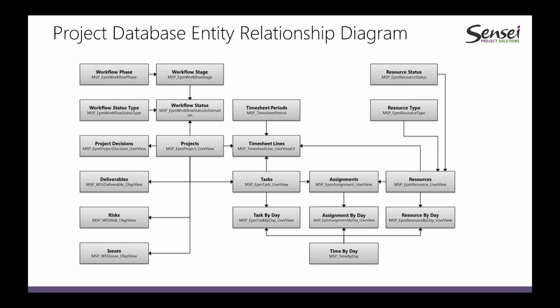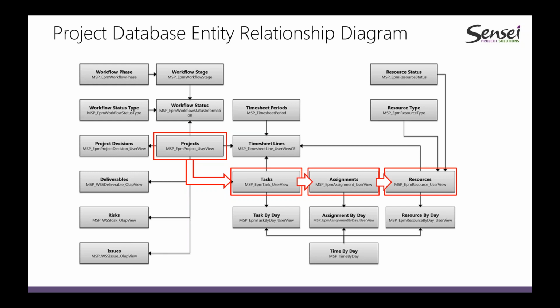And there's a very classic relationship between these entities that I want to diagram out here. So generally, projects contain tasks. So that's an important one. Now, tasks contain assignments. So an assignment is when a resource is assigned to a task that creates an assignment.